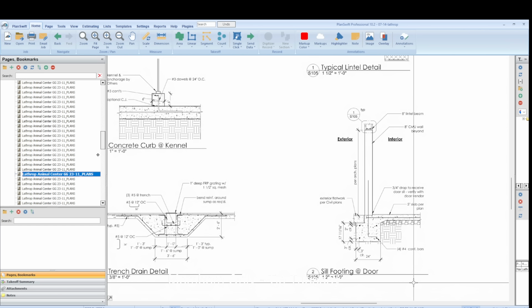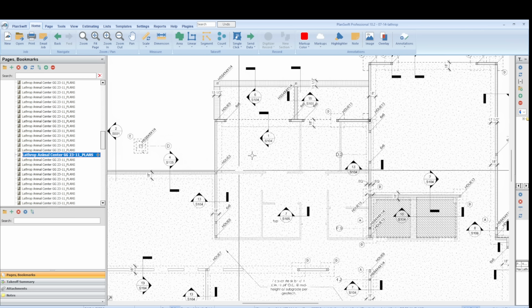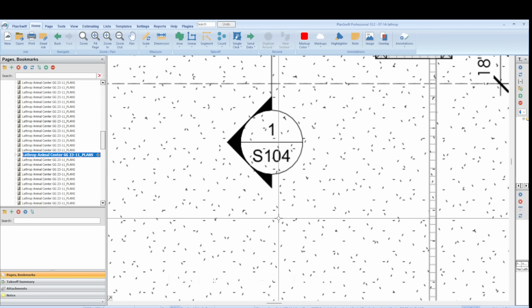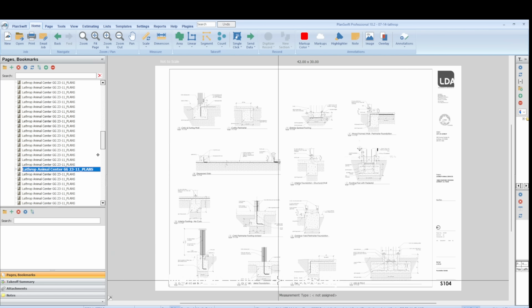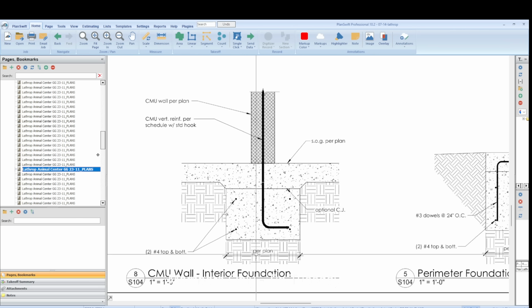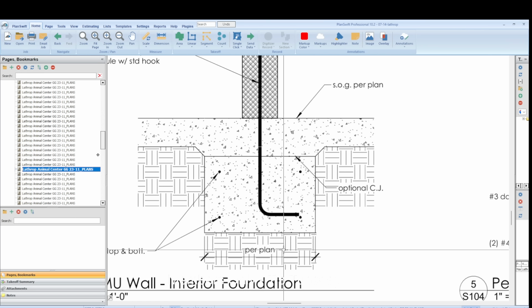But as far as tips for your foundation, it's the same as if you're the framer. You need to break down all of the foundation footings based on the section views. Go to each of the section views, like we just did, and determine the depth, how deep, and how wide. If it says per plan, then somewhere on the plan it'll tell you. You won't have to guess.